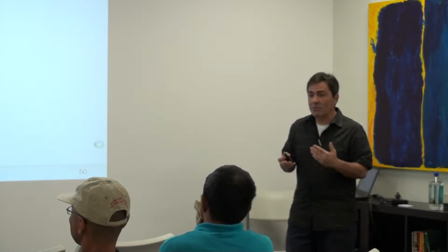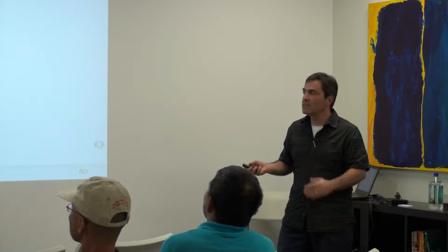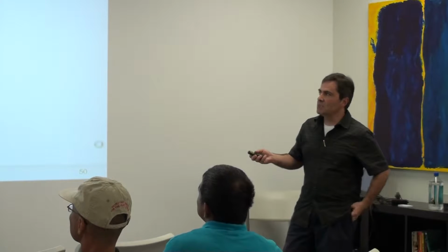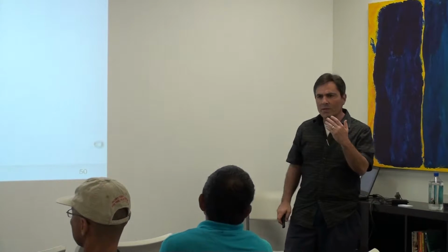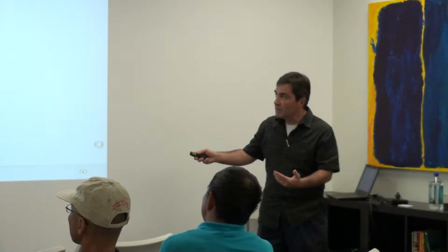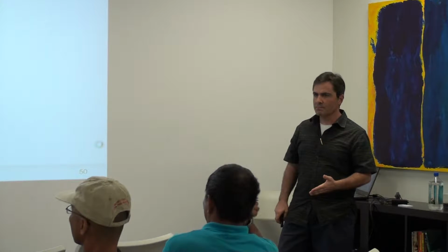So if you're not really careful with that, you can end up not being able to complete what was committed for that sprint. But what we do is we say we have a time box. That's what a time box is. By definition, whatever you get done, you get done. Whatever you don't get done, it just doesn't make it into your small, potentially shippable increment, right? So we force the synchronization.